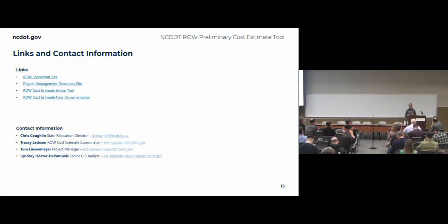Now that's something that, from an estimator's perspective in a late stage tool, they can go in and renumber on the worksheet. They could always renumber, because in the late stage tool, it's going to be your GIS shape files submitted plus your plan sheets. So they could always renumber them on the worksheet to match your plan sheets if they want to do it that way, when they're reviewing and they're boots on the ground and actually looking at each parcel on the ground.